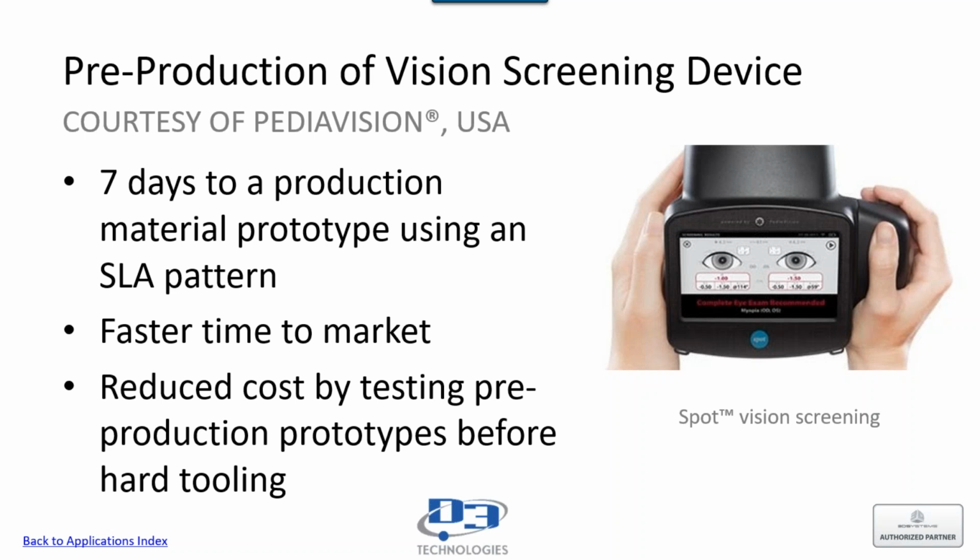And then the rapid prototyping allowed them to compress their schedule by about 3 to 6 months. So the quick plastic cast urethane process combined with 3D Systems knowledge allowed them to reach production much sooner and reduce their tooling costs as well.